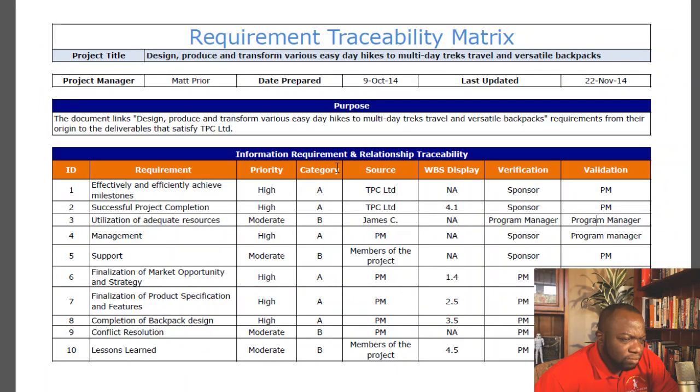I would try to marry this to some projects you've done in the past. I used this on a project at Honeywell back in the day. That was my first encounter using it, but I found it very helpful to track over 120 requirements to my different requesters. I had like 7 different business unit leaders who were asking for certain requirements to be inherent in the implementation. How did I keep my sanity? By using a requirements traceability matrix and tracking each requirement to each requester.